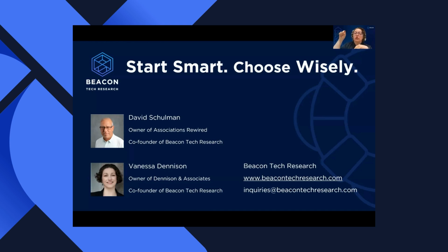Look at those and say, okay, if this was the requirement, here's what we need to test to make sure that we can still do this in the new system and everyone understands how. But you'll have to make a plan for what you're going to test and how, and make a plan for how to collect that feedback and feed that back to the vendors. Make a plan for how to address when they come back to you. That whole process is not usually supported much by the vendor.